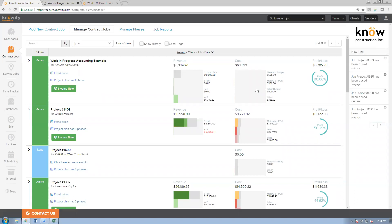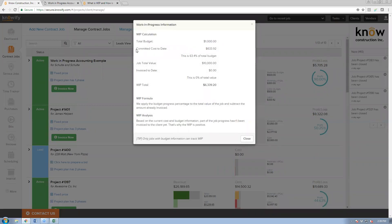As you go through Knowify and you're tracking all of your material costs and logging your time in the project, we get to see how far we are as far as cost versus budget goes. Since we have the contract total, we can get you that work in progress number by taking your percentage of completion — which is cost versus budget — and multiplying it by the contract value to show you work in progress as a revenue number. We do have a setting in your admin section if contractors would rather not see it as revenue. We can show you where this number is coming from: your total budget, committed costs. That's how we prefer to calculate these numbers in Knowify so you can see in real time where you stand on the project.